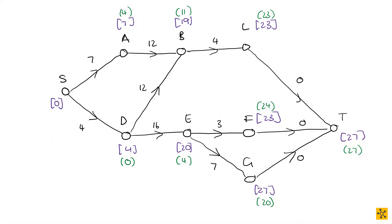So now we have our graph that basically has the earliest finishing times and the latest start times. And this can easily show us which one is our critical path. The first thing you'll notice is obviously where the latest start time is zero — that's definitely on our critical path. So D is definitely on our critical path.